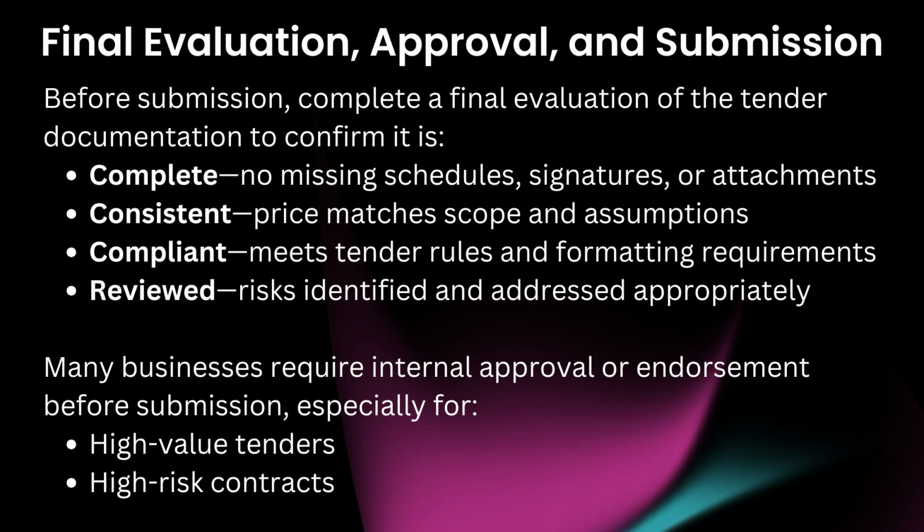Final evaluation, approval, and submission. Before submission, complete a final evaluation of the tender documentation to confirm it is complete, no missing schedules, signatures, or attachments, consistent, price matches scope and assumptions, compliant, meets tender rules and formatting requirements, reviewed, risks identified and addressed appropriately.